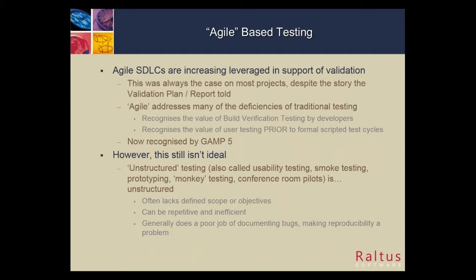And what we also find is if we wait until we do formal testing to identify these bugs and issues, it's relatively expensive to fix those issues. Typically, the later in the software development lifecycle we find these issues, the more expensive it is to fix. We have to go through a change control process, project change control, do extra documentation. It's much better if we can find all these obvious and less obvious bugs earlier in the development lifecycle, where we can fix some of the obvious things before we enter very formal change control.